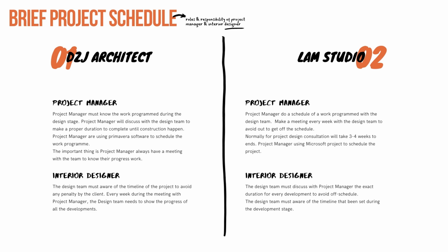For IM Studio, project manager do a schedule of work program with the design team. Make a meeting every week with design team to avoid out of schedule. Normally for project design consultation will take 2, 3, 4 weeks to end. Project manager using Microsoft Project to schedule the project.